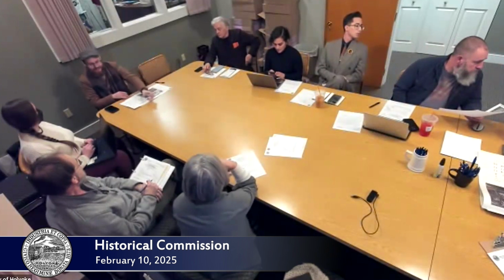I'm happy to enlighten folks on the process for state credits further, but it is a complex process, I will surmise. I wish it was easier. Does that add time to the project? Yes, it typically does. I find usually the challenge is you have all these different funding partners and getting them to the same gate. I kind of picture it like a horse race where you have to line everybody up in the same readiness to get ready, and then from there we can actually push the closing.